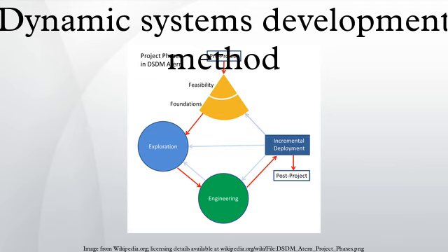The main idea behind time boxing is to split up the project in portions, each with a fixed budget and a delivery date. For each portion, a number of requirements are selected that are prioritized according to the MoSCoW principle. Because time and budget are fixed, the only remaining variables are the requirements. So if a project is running out of time or money, the requirements with the lowest priority are omitted.